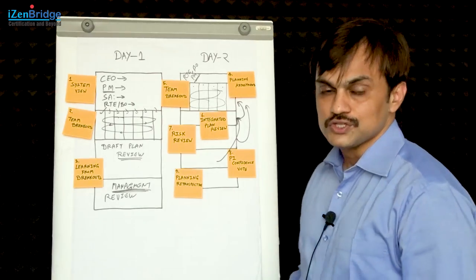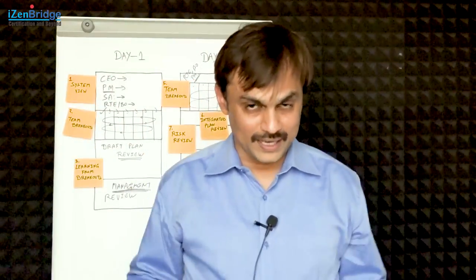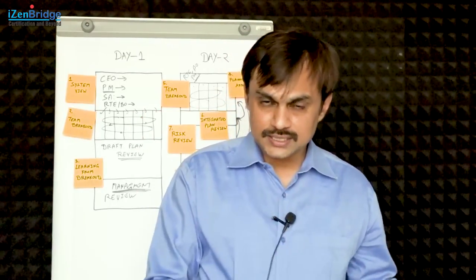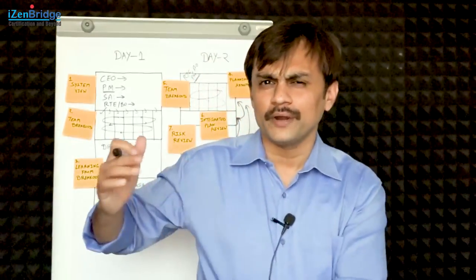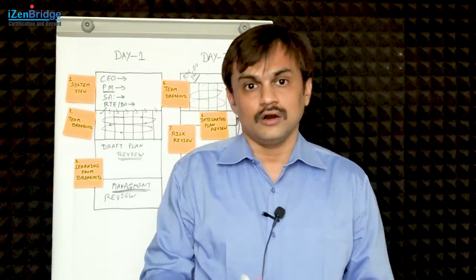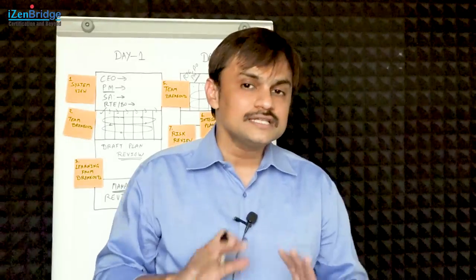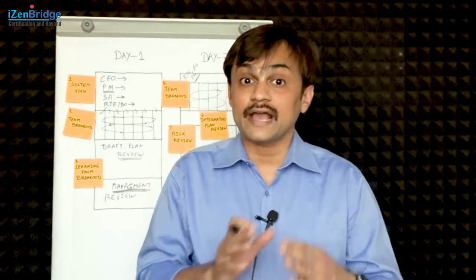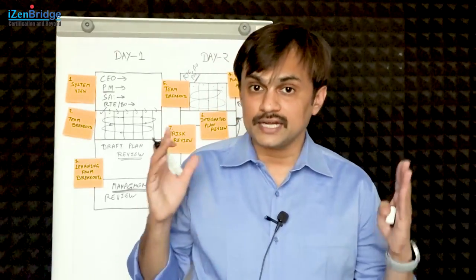Finally, we reach to a stage called planning retrospective. This retrospective is not a retrospective of your whole PI - it is only a retrospective of the PI planning meeting itself. You have been planning for the last two days and you might have observed things like we should have done this differently, or next time we should have more breakout rooms, or we should have these things cleared before coming to a PI planning meeting. Or you may realize the debriefings are taking too much time - can we optimize by having some kind of email communication in advance, or dividing the PI planning meeting into three days or four days rather than running at stretch for two days?